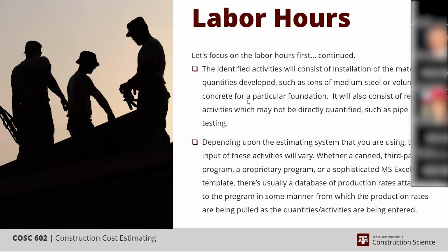Even behind that, there's a whole list of activities that you're going to select from, and it usually will select them for you unless you start going in deep into the system and determining individual items. But on the other hand, if you're using a program like Sage Timberline or WinEst or Cleopatra, you have to build your database. You can purchase databases and drop them in, but they're generic.